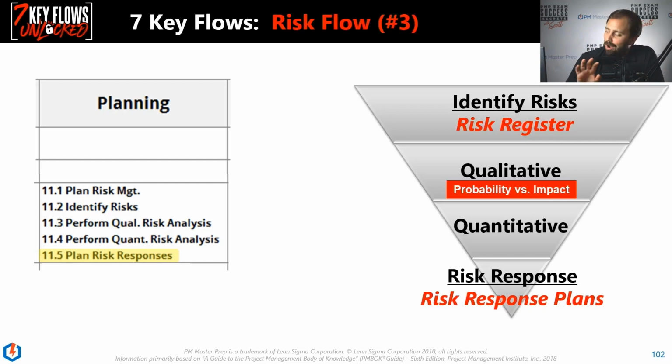All right. Now, risk responses, I'll ask you a simple question. Free or not? No, not free. Nothing in life is free, unfortunately. All right. So these cost money. So where is that money accounted for? That money is accounted for in the baseline because we know about these risks. We've identified them, we think there's a probability that they're going to occur, and we know what the response is going to be to deal with them. Okay. So we're going to call that contingency reserve. Contingency, I've made a C and I'll make an R, whatever. Contingency reserve. And that goes back into our baseline.